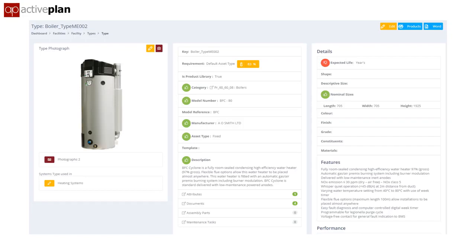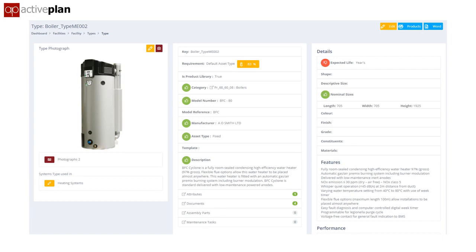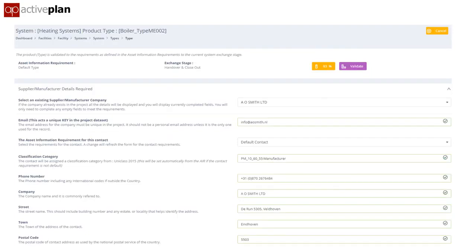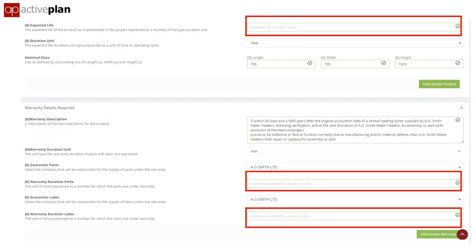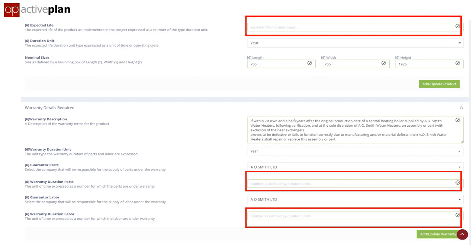In this case, the system is checking against the client's requirements and reports 83% complete. The validation summary shows that expected life and warranty information is missing. As an alternative to filling in spreadsheets, we provide contractors with a simple online form that highlights what's missing and allows them to fill it in. These are three different ways the contractor can provide the as-installed information, and we're now exploring a fourth by integrating with their procurement systems.